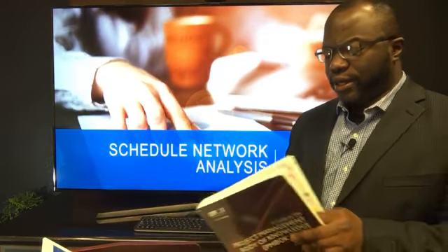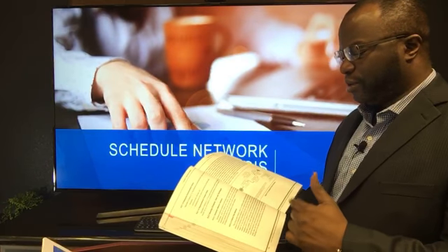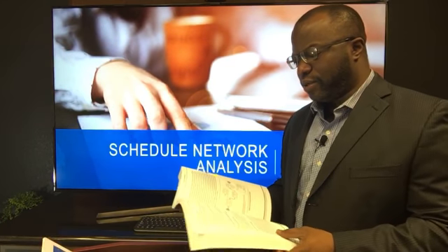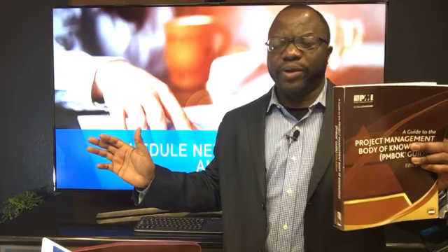So adjusting that schedule based on the network diagram that you have and using all of these things they've mentioned: critical path, critical chain, what-if analysis, and so on. Okay? The key thing is your critical chain. I've got a question come in from Ravi. Your critical chain is your resource-constrained critical path. The critical chain is after the critical path. Critical path comes first. You find your critical path. Resources have been assigned. We know it's constrained, and based on that, we make adjustments.